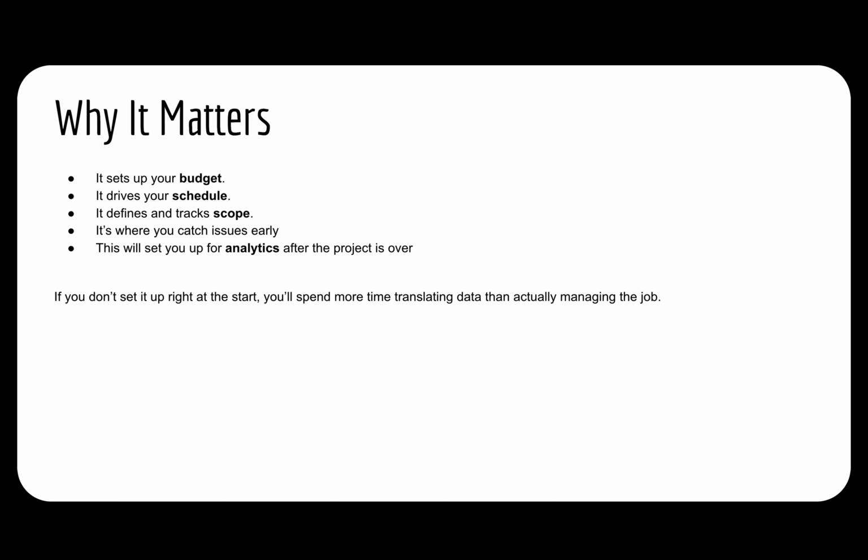So then you have a better understanding of how much you spent on your concrete or your electrical or even your project management labor. If you do not set it up right, you'll spend more time translating the data than actually managing the project. A billion line items, it's going to be really hard to manage on that level of detail if you are a general contractor and don't have any self-perform work. The opposite is also true. If you do have just 2 line items, then it's hard for you to really analyze and understand where your problems and your risks are.